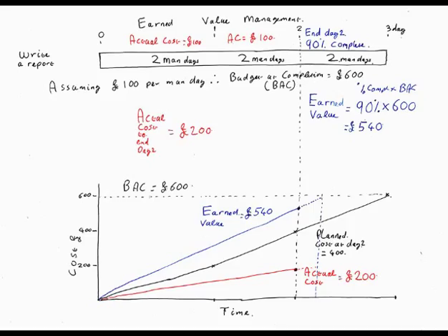You want to do disadvantages? Yeah. If you just do one earned value figure for the whole project, you can bury bad news. So bad news can be masked by the overall figure. It's sort of camouflage, isn't it? It's the oldest technique. What other disadvantage? You need to be able to measure percentage complete accurately. And on a report, that's really hard. On a software system, that's really hard, so there are whole chapters on that bit.